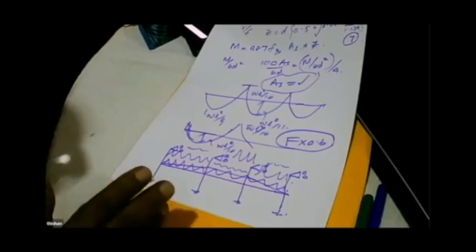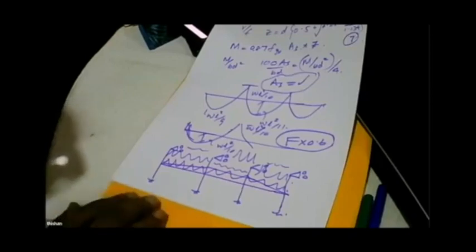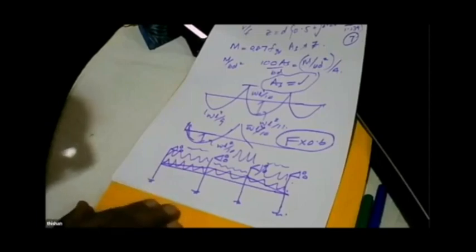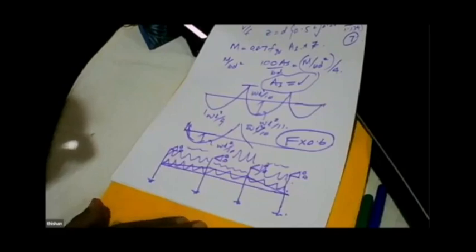Because when you are in a 5,000 million big project, 30-story or 40-story building, it will cost 5,000 million, right? And you are going to reduce the cost of the structure by 40%. So in a 5,000 million project, 2,000 million will be the structure. Out of 2,000 million, you save 40%. So you save 400 million, right? Whereas the design fee is 50 million.